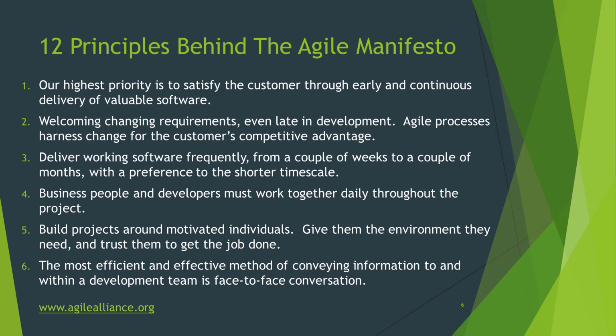So you have your product requirements backlog, and usually the cadence of delivering sprints is identifying what you can realistically deliver within a 3-week period, could be a 4-week, 5, or 6 week period. I haven't typically seen the cadence go longer than 6 weeks, but what's more common is a 3-week sprint.